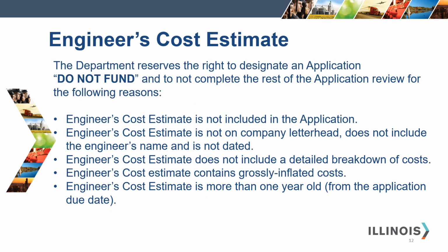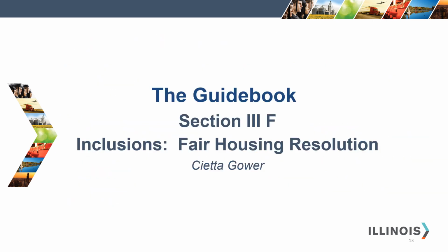The engineer's cost estimate is so essential that the department reserves the right to designate an application as do not fund and to not complete the rest of the application review if the engineer's cost estimate is not included, if it is not on company letterhead, if it does not contain the engineer's name, if it is not dated, if it is more than 1 year old from the date the application is due, if it does not contain a detailed breakdown of cost, or if it contains grossly inflated costs.